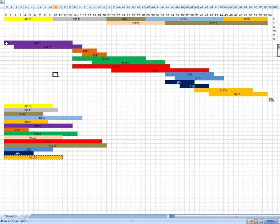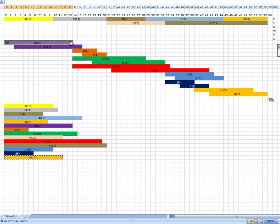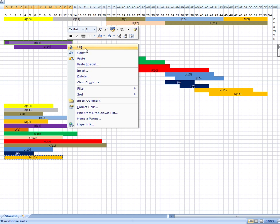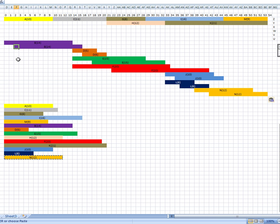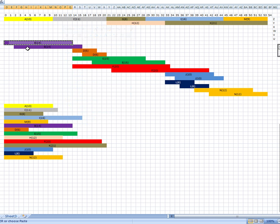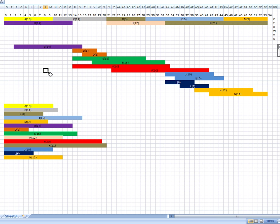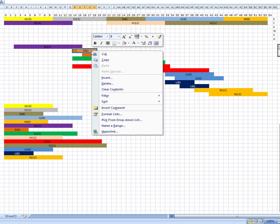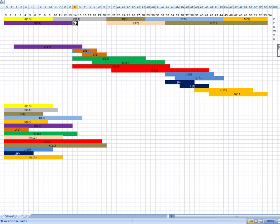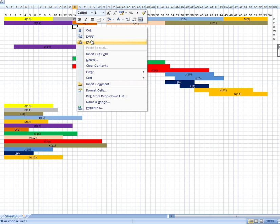So that's answering the question there. I'm now just going to show you how to allocate all these jobs to different people. Basically, we go through them. We put the critical activities to workers originally. So I've called this worker Z. He has to do one of the critical paths. If there's other critical activities, that must be done by another worker. I'll call that Y. Now, I'll go through all the other jobs. And basically, I'm going to allocate them in order of what's the most urgent. B has to have started by 2. So we've got to get B started as soon as possible. And that means allocate B as soon as you've got a spare worker. Worker Y can start B at time 0. Now, the next urgent is D, which must be started by here. Start it as soon as you can. So you might notice I'm saying one thing and doing another here. The next urgent is E. It has to be started by here. Unfortunately, we've got no worker available to start it by then. So we need another worker. Call that worker X. Worker X can start it as soon as possible there.